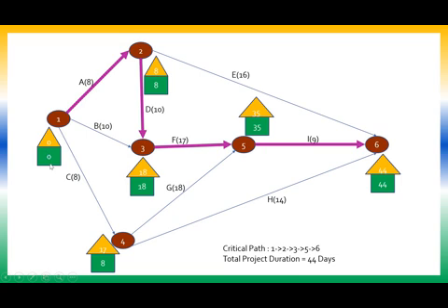So as I told in the previous problem, if you check the rectangles and triangles in the network diagram, you can highlight 0, 0, here I have 8, 8, here 18, 18, 35, 35, 44, 44. So the critical path is 1 to 2, 2 to 3, 3 to 5, 5 to 6.